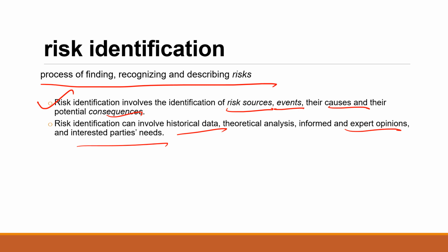So risk identification is important. You can manage a risk only when you have identified it. I also mentioned earlier that whatever you do, you can never say that you have identified all the risk. If you follow good best practices, you will be able to find most of it. But risk is dynamic, it's not static. Risk can change, and that's the reason you should have risk monitoring also, so that anything which is coming you can identify. So it is going to be an iterative process. From the monitoring also the feed comes to risk identification. It is a process of finding, recognizing and describing risk.